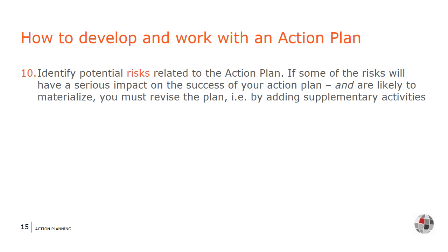What is important is not so much whether we call a certain possible event an assumption or a risk, but rather whether we can find a way of making sure that it does not hinder the successful implementation of our development intervention. If you, by adding some supplementary activities, can eliminate or considerably reduce some of the risks, then you will have a more solid project, and then you only state the remaining risks that you will need to monitor during implementation.